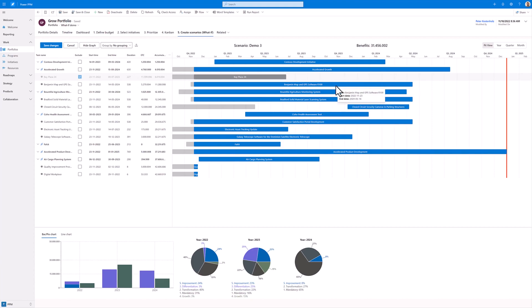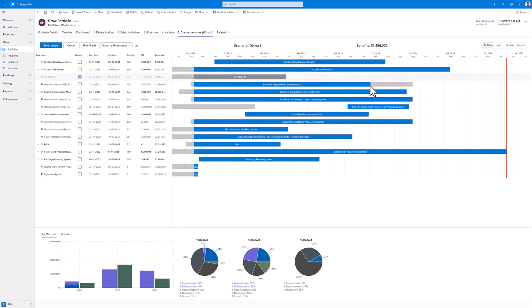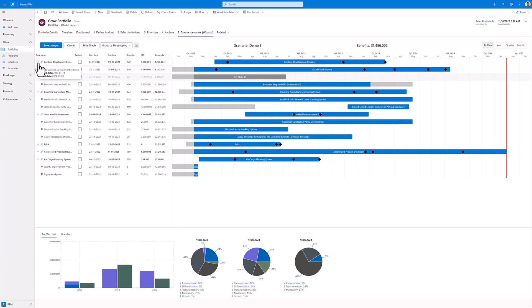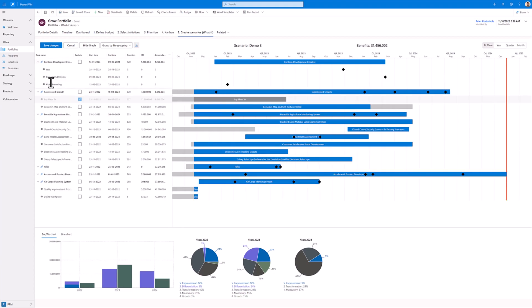I can also do the opposite, where I take a different project and if I expect that we need to close this project before 2024, I can decrease the duration of the project and get an overview of the financial effect while still retaining information on the project baseline. If I want to get an overview of milestones for the different projects, I can click here to toggle the milestones on or off, and then we can see the milestones for those projects that have milestones specified. I can also expand the individual projects to get further information on the milestones.